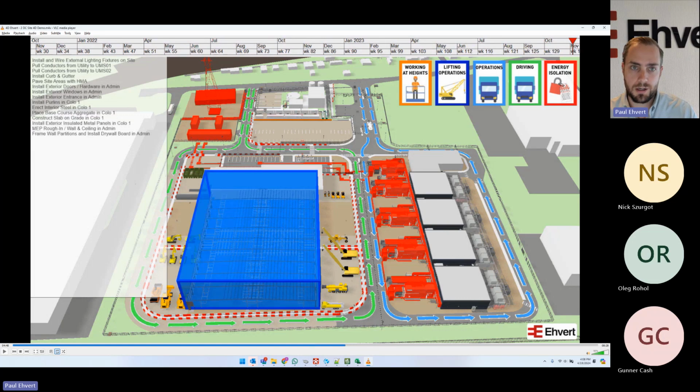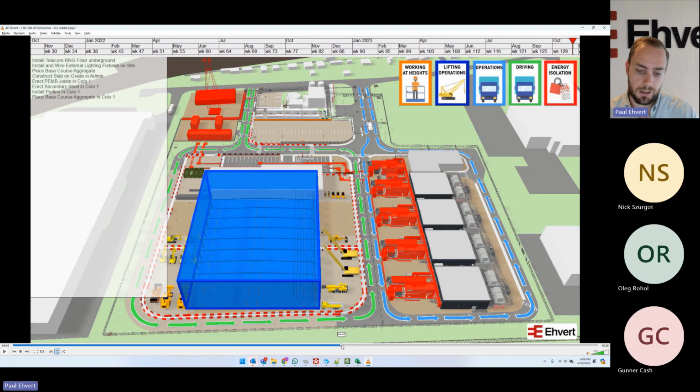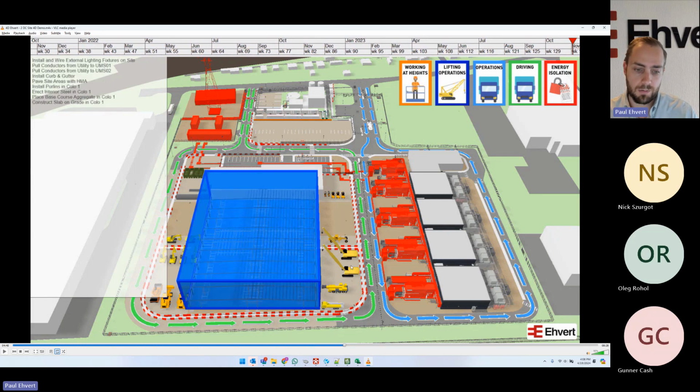So typically when we do these efforts, we're producing drafts every 2 weeks. I think in the beginning it'll probably be every 2 weeks just as we're getting everything set up. But then going forward, we can probably make updates for your team to review every week. And then we'll just have sample animations like the one I'm showing here that will circulate for your team. And again, the real value add is incorporating feedback and your knowledge and your expertise.